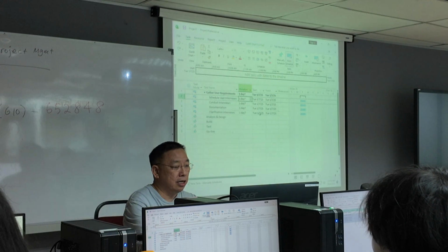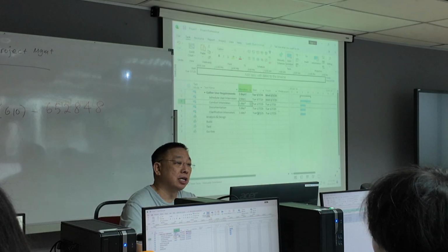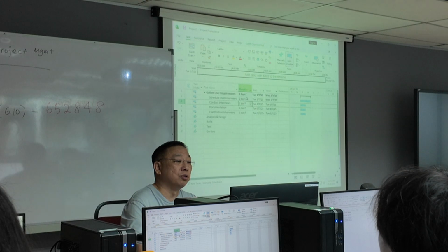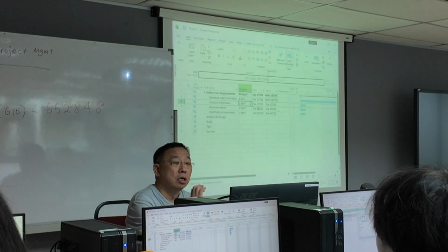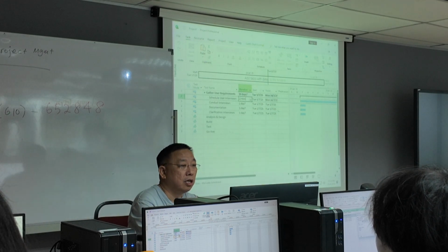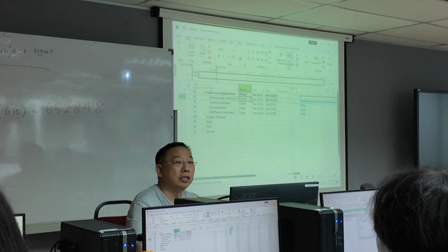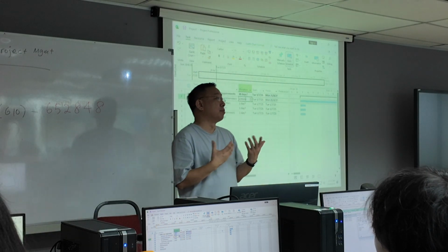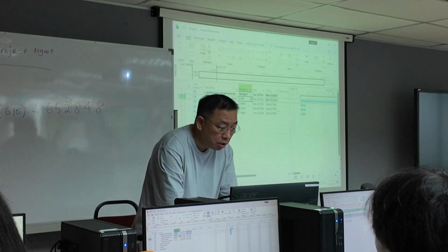Schedule interviews. Let's say I can put 2 days. Okay. So you can put 2 days, and you notice the Gantt chart on your right expands to Tuesday and Wednesday, right? So there are a couple of other things you can do besides 2 days. You can say 2 weeks. It goes longer. Okay. You can say 2 months, and it goes really long. You can't see it on the far right. Okay. But I want to tell you that in project management, especially for software projects, most of the scheduling is by days. So stick to days.